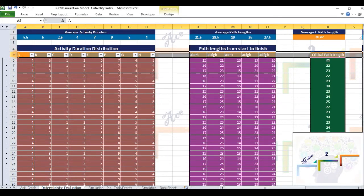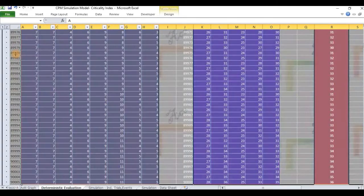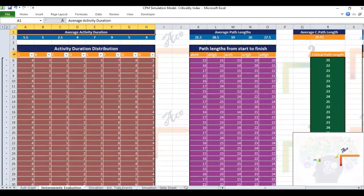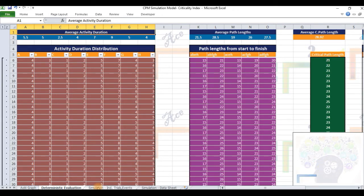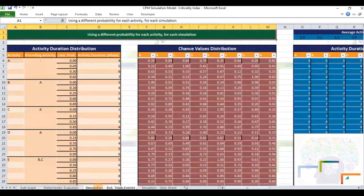Fortunately, there are methods using which we can avoid evaluating the population of 90,000 possible scenarios. Simulation allows us to generate a convenient sample and base our analysis on that instead of on the exhaustive set. This is what we do in tab 3 titled Simulation, Independent Trials of Independent Events.